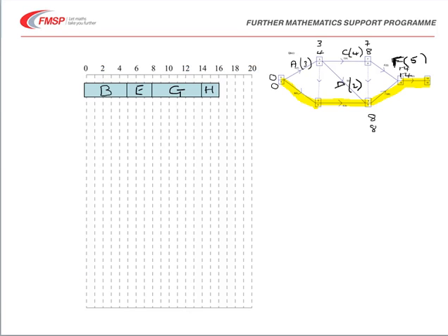Well, the next part of the question, we're asked to complete a Gantt chart or Cascade diagram. Now these always start off with the critical path activity, so I've put those in, B, E, G and H, onto the diagram already, and also I've highlighted in the small diagram to the right the important parts of the information that we need to complete the rest of it. I realise that the diagram is a little bit small to see on screen, but really all we need to know are the activities that we need to add into the diagram, their lengths, the early start time and the latest finishing time.